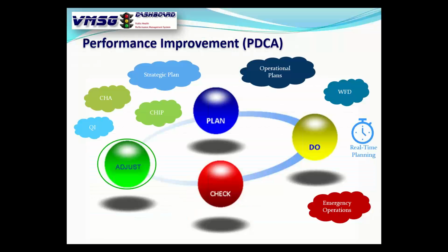So now back to the PDCA cycle. At this point in time, we're probably going to want to make adjustments to get back on track. A couple of adjustments that you can make. Now, depending on the situation, we have this COVID thing out there. You're probably not going to be able to apply additional resources. Maybe not apply additional resources to get to that 25%. So let's make it a successful plan. Let's take the plan down to 21%, knowing that at the end of COVID, we're going to be able to get back on track so that we can track the plan at 21%.